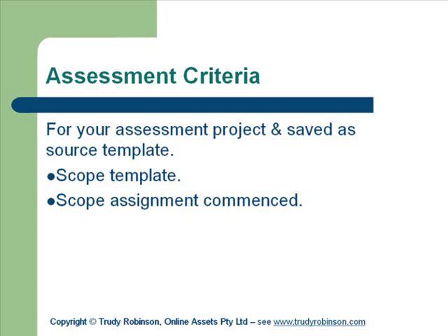Yep. The scope document seems to be like an overview of what can happen or can't happen. Yep. So obviously there's different scopes as well that you have to give to the plumber or the electrician. No, scope of works is a bit different. This is a scope based on the whole project. It's not normally a scope of works. You're not doing a detailed spec of works, which would be different again. From the HR point of view, to finish the subject tonight, the two requirements are for you to put the stakeholders in that document and to understand why they're there, and to do your position description.